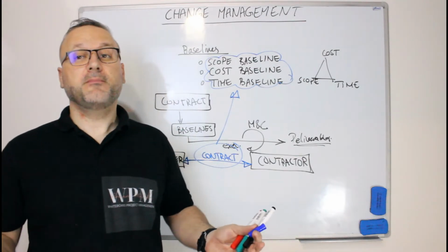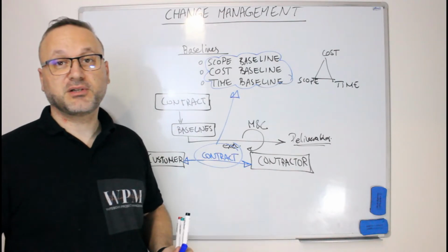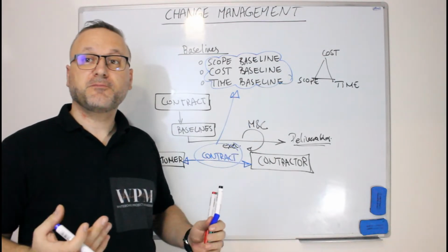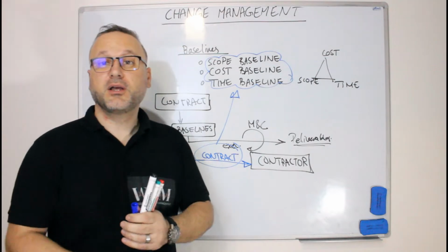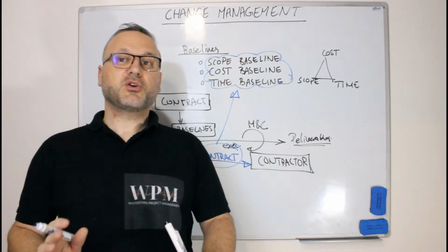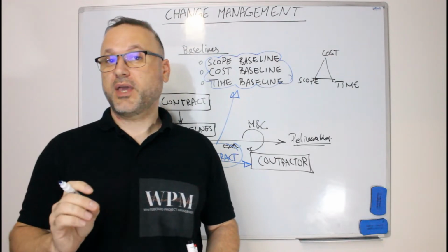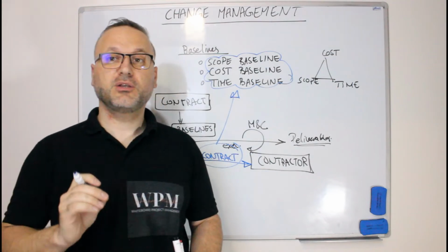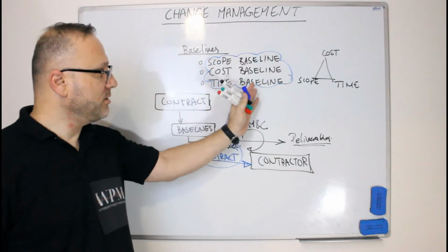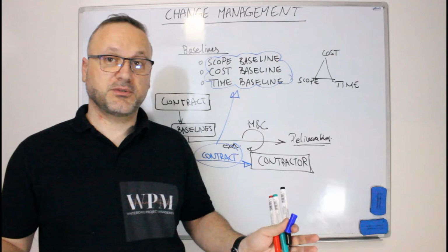Let's say you are making a design and the design is not logical to make the deliverables correct as per the contract. So you as a project manager are committed to deliver everything as per the scope, but meanwhile you are committed also to deliver the project in a logical way. So if there is any change required, you have to notice, you have to inform your client and tell him, look, the baseline is not realistic and we need to change it.